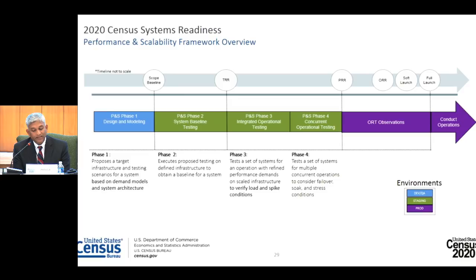What I would like to highlight here is that phases 1 and 2 must be completed by the test readiness review date, and phases 3 and 4, as applicable, must be completed by the production readiness review date. That's how the performance and scalability testing is integrated into the overall progress monitoring of each system as managed in the integrated master schedule.